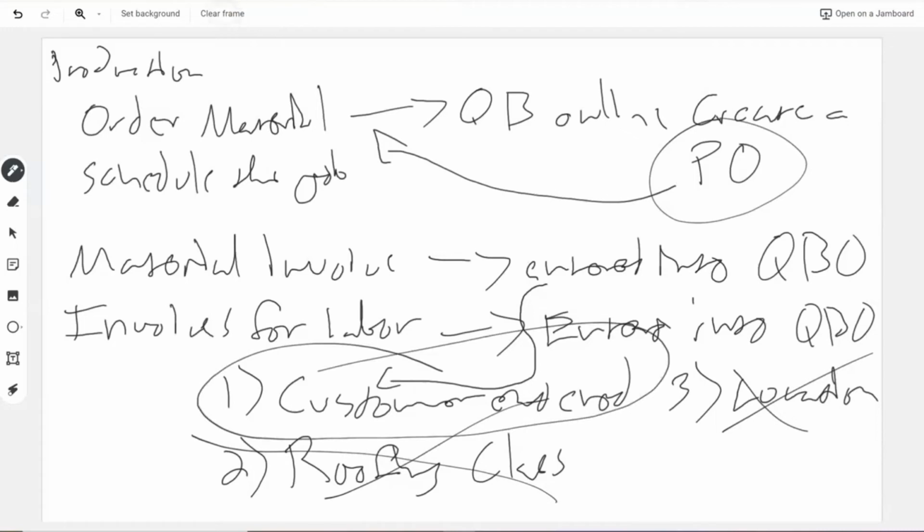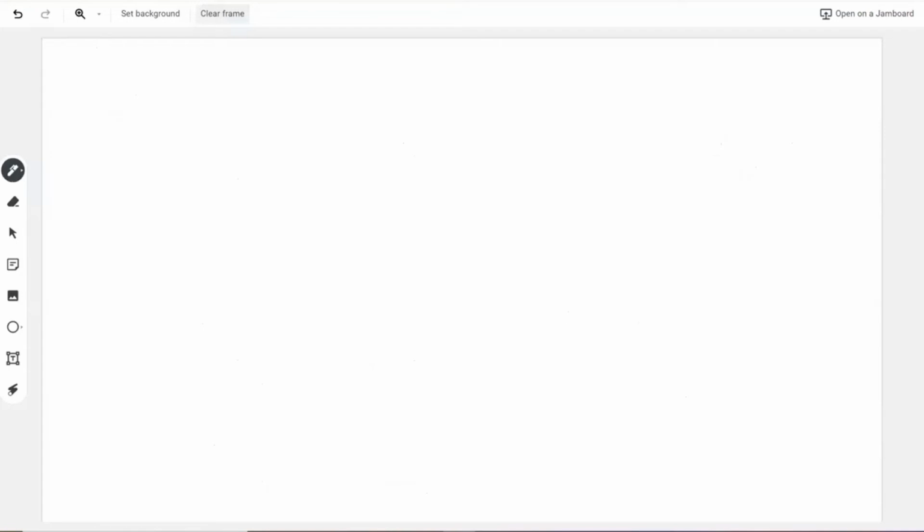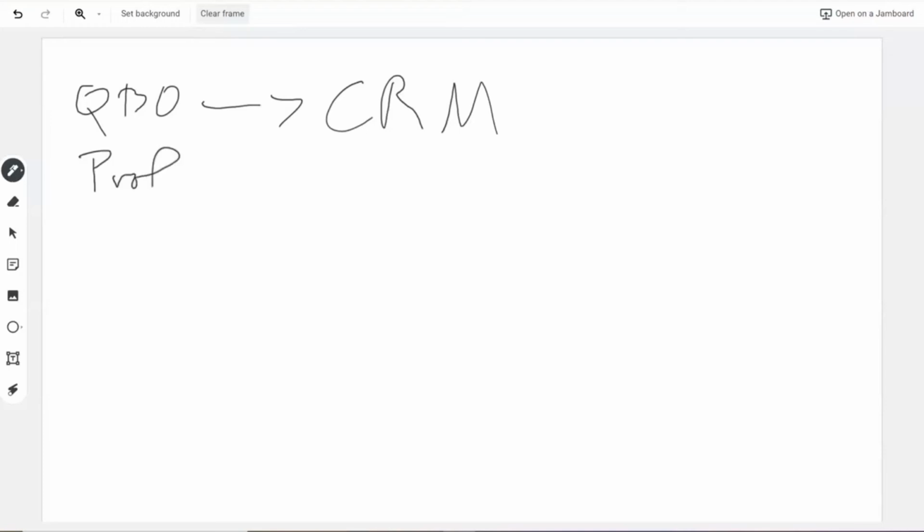So once that happens, guys, we've got all the expenses entered into QuickBooks Online. As they get entered and associated to that project, QuickBooks Online pushes that back to the CRM. And again, like I said, we have our setup in AccuLink, so it pushes it into AccuLink. When it does that, it creates what's called a profit analysis, which shows the real job costs, or the real profitability of this job.